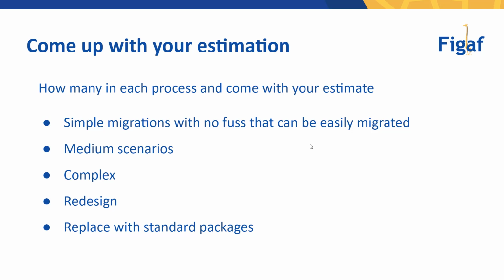You need to come up with your estimate, and depending on how you want to do this, you could look at simple migrations, with no fuss, that can be easily migrated, and come up with a time for this. Then medium complex scenarios, and redesign, which would be scenarios where you say, okay, this is completely bogus, or scenarios using BPMNs, where you say, okay, we don't want to use BPMNs in this diagram, so we need to redesign them from scratch.